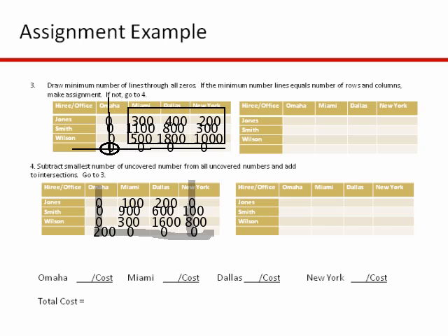And again, it's still less than 4 what I need, so I have to go back to step 4, and I'm going to subtract 100 this time because 100 is the minimum number of what is uncovered. All right, so what I'm going to do here is just type these in real quick. So I'm going to have a 0 there, a 0 there, I'll have 100 there, and a 0 there.